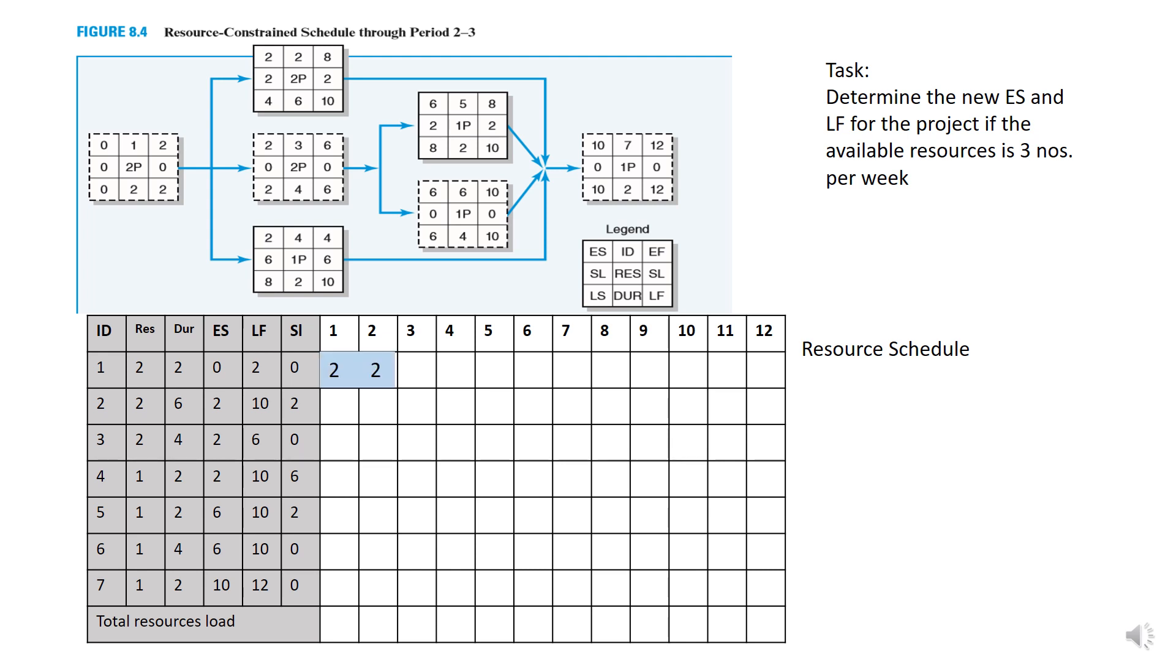Next, you need to include the number of resources for each activities per week. So you need to draw a bar chart. For activity 1, it starts on 0. In this case, it is week 1 and completes in week 2. Thus, first week requires two numbers of resources and so as the second week.